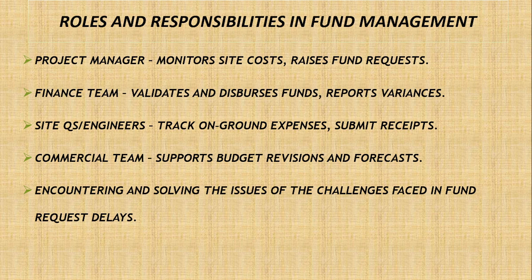Roles and responsibilities in fund management. Project manager monitors site costs, raises fund requests. Finance team validates and disburses funds, reports variances. Site QS or engineers track on-ground expenses, submit reports. Commercial team supports budget revision and forecast. Encountering and solving the challenges faced in fund request delays.